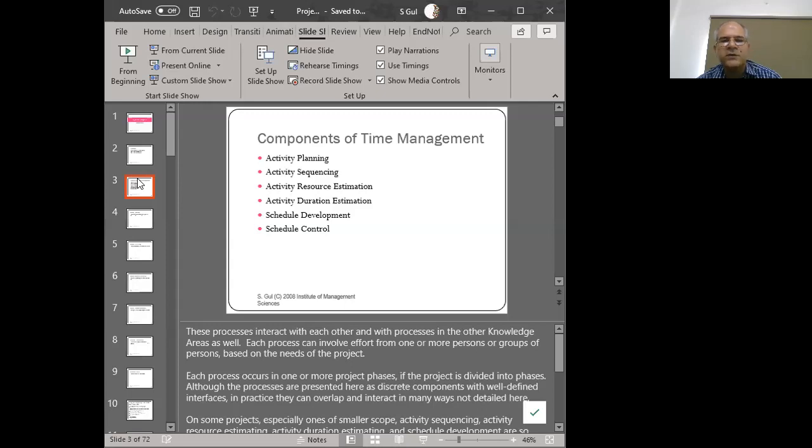So clearly what we require is about 2.5 people working on our activity in order to complete 40 hours of work in 2 days, right? Some of these people can be working full time, some can be working part time, etc. So some sort of combination has to be thought out so that these 40 hours could be completed in the 2 days. So that's the activity resource estimation.